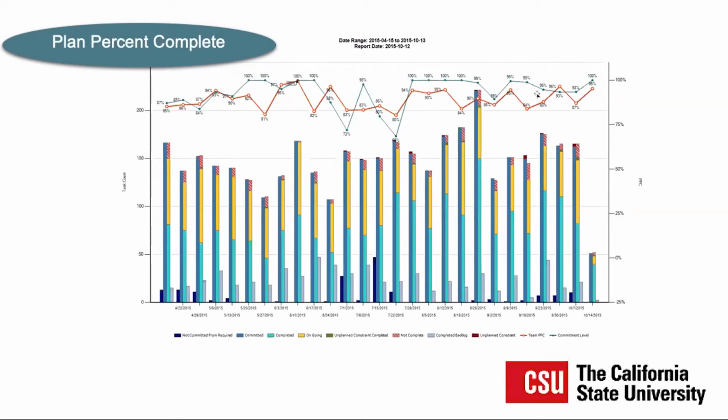That's pretty good. The other thing you want to look at is how deep these peaks and valleys are. We see some teams that had 100% this week, and the next week they're down at 50. That's unpredictable and unreliable, and that creates havoc on the job. So you really want a narrow band, and the only way you're going to know how well you're doing is by tracking that and visually sharing it as a team.